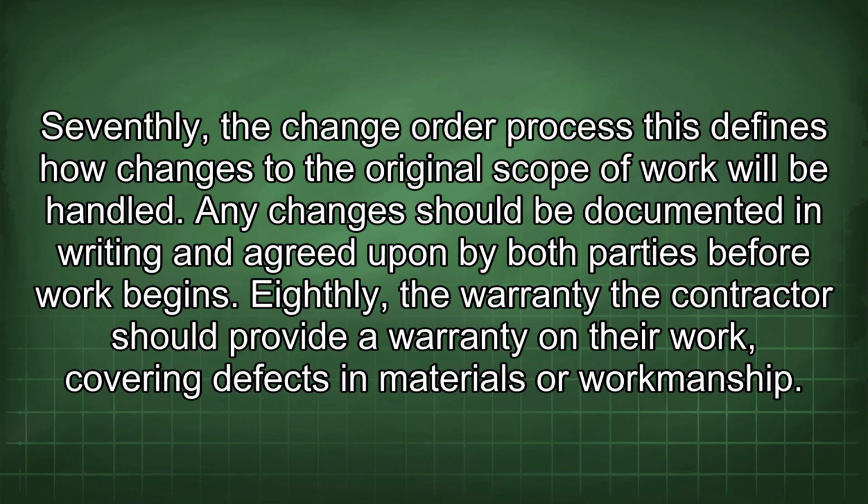Seventhly, the change order process. This defines how changes to the original scope of work will be handled. Any changes should be documented in writing and agreed upon by both parties before work begins.